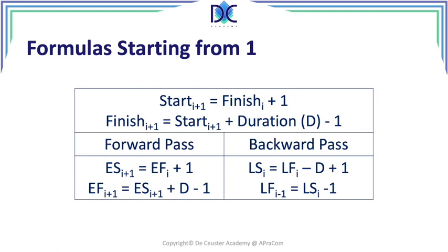So this was an interesting video about the different calculation methods. I know a lot of people have discussions and problems with it. They are basically similar. They have advantages, disadvantages. Using the cardinal numbers gives you the possibility to use durations with decimals, which you cannot do with the ordinal method when we start from 1. The method starting from 0 may be more natural for most people.